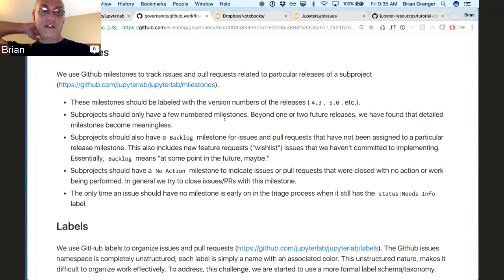And we felt like the backlog, at least how we're starting to use it, is a place that would force us as core developers to go back and revisit regularly and say, all right, we just released the beta. Let's create a 2.0 milestone and go through the backlog and understand which of the backlog issues we want to target at 2.0. We felt it was a slightly more proactive way of managing and making decisions about the backlog.